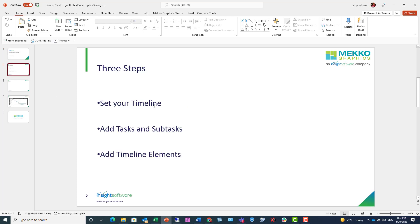There are three basic steps to create a Gantt: set your timeline, add tasks and subtasks, and add your timeline elements.